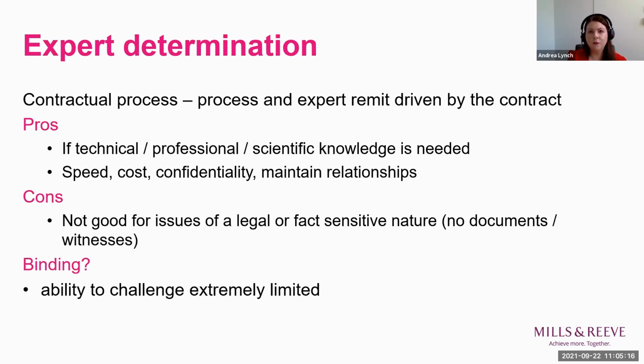Thanks, Ben. And what would you say are the main benefits of using expert determination? Yeah, there undoubtedly are some. I shouldn't cast aspersions completely. It's less formal than litigation or arbitration, so it's generally quicker, it's generally more cost effective. It's also a confidential process, so it offers the parties a way out of a dispute whilst giving the chance of preserving an existing relationship.